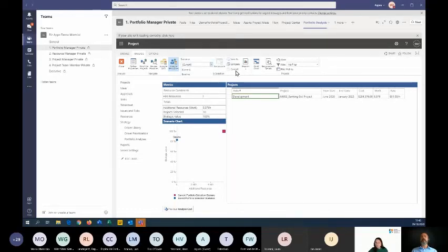And what that does is it populates 6 fields back into your Project Online instance that would suggest that the project start date has moved to a future date, and that would prompt the PM to go in and change those dates manually in your project center.